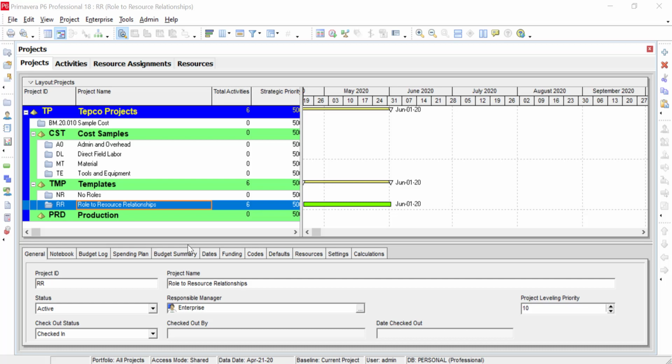but we use a lot of templates, and if you're using templates, which we strongly recommend, whether it's a phase gate process with front end loading, or it's an engineering step, or it's a construction step of activities that you can template, 100% recommend templating these activities. Once you get these activities templated, you want to role load it because you may not know who's actually going to do the work.